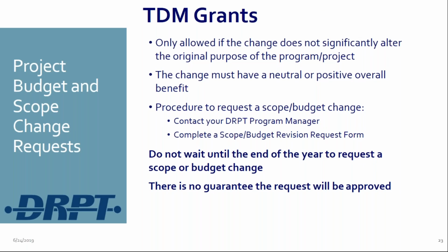So when you're talking about a budget change, let's say you're going to have to add dollars to a project just because you want to. Usually a budget change is going to be part of a scope change as well. Let's say you have a project and you want to switch gears as to what marketing you want to use. You want to do print ads or something that's going to increase the budget. That has a good chance of being approved because you're staying within the scope. You're still doing this marketing campaign, you're just changing how you're going to deliver it, but you're going to use something that's going to cost more money. So we'll say, all right, scope change sounds good, you're not changing it. Budget sounds good.